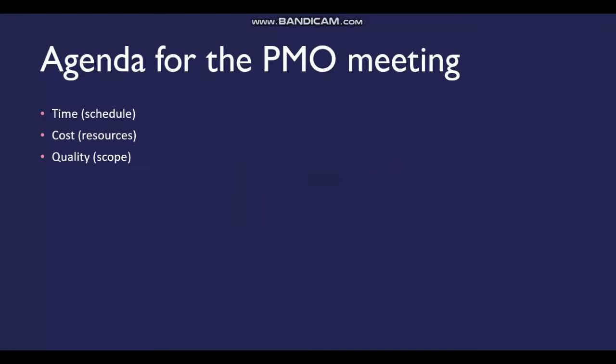Time, of course, refers to the schedule and the timeline of the project, and as the project is being tracked, the various issues around it are tracked against the original baseline, bearing in mind any problems that have occurred with regard to being behind schedule or ahead of schedule. Obviously, the critical tasks versus the non-critical tasks have to be discussed. The reason for that is that resources can be borrowed from non-critical tasks to accelerate the critical tasks should they be under threat.